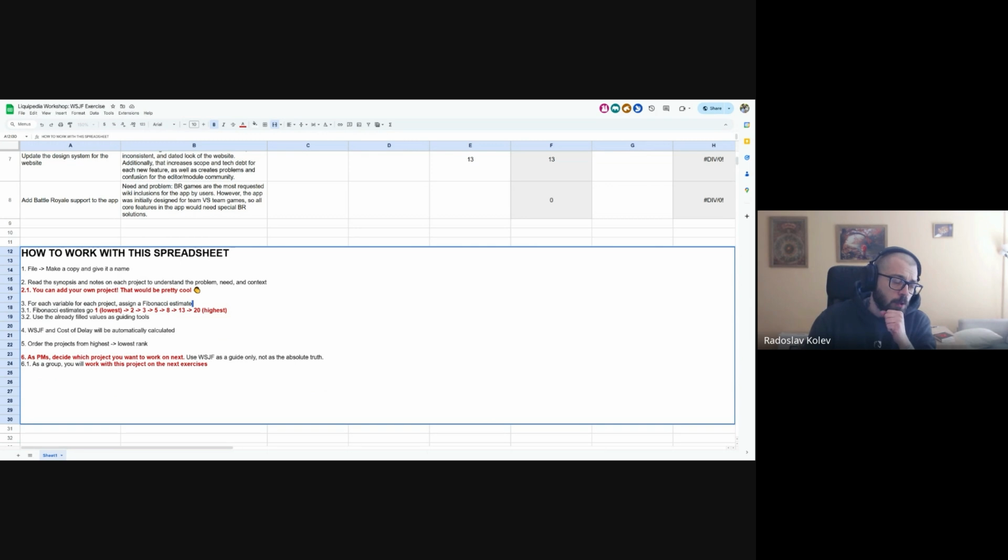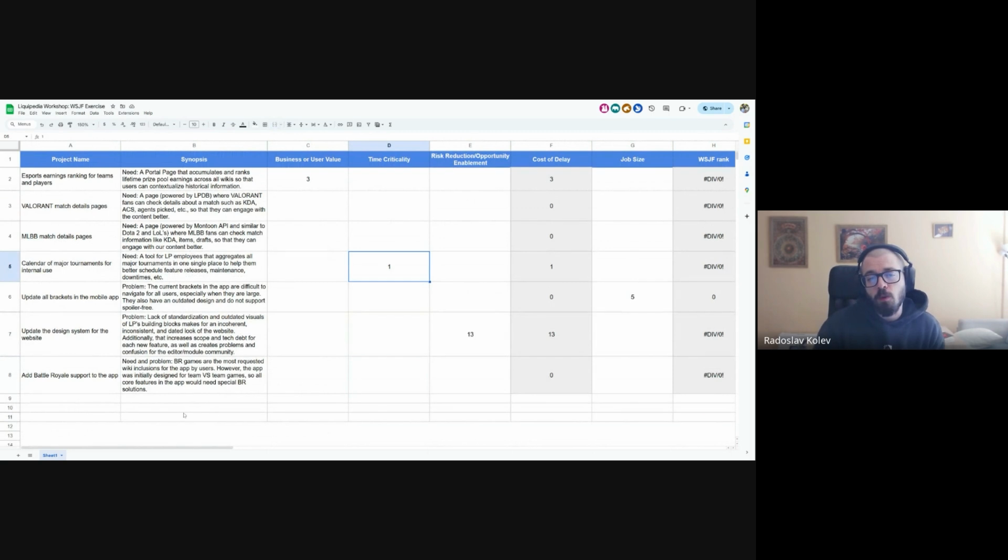And one thing you also have to remember is that these estimates you give are in relationship to each other. So for example, if you see that a project has a value of 1, and you consider the other project to be 5 times as valuable, you would assign it a 5. These are not absolute numbers.